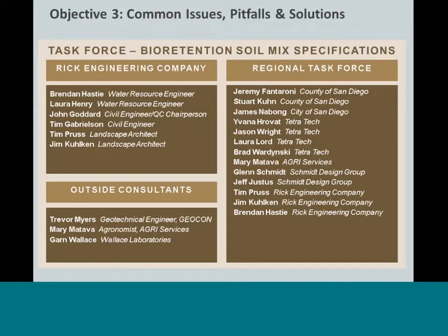So just getting the word out and opening that line of communication to avoid that is a big step towards that. But again, those are the two issues we wanted to address with some specifications. Public works projects are always going to have specifications, but we found a lot of private projects, you typically just have your plans, and so you don't have that set of specifications. And something we're doing now is putting a dedicated sheet on plans to make sure that these specifications are part of the bid documents, even for private projects.